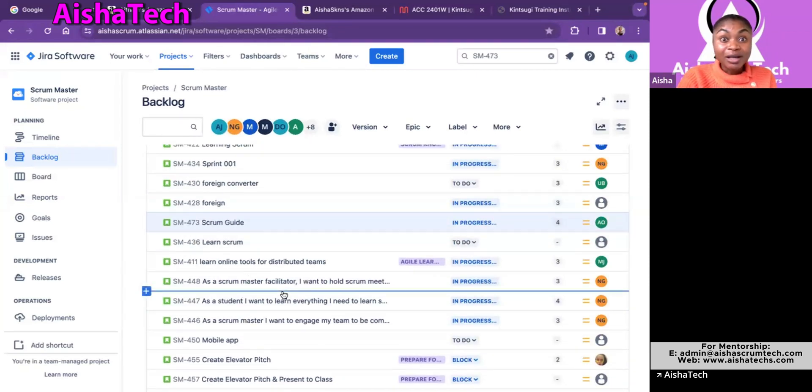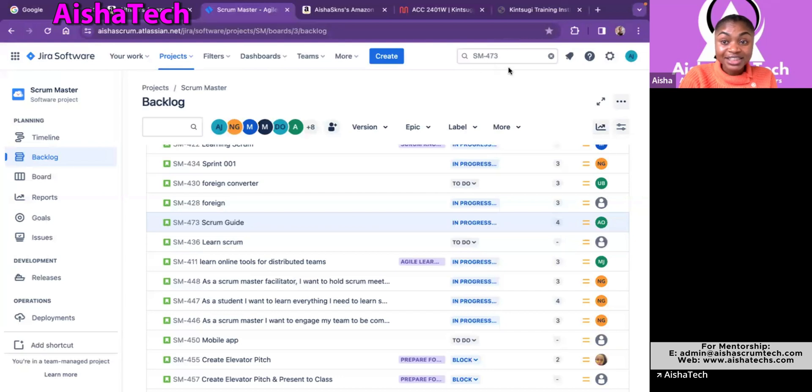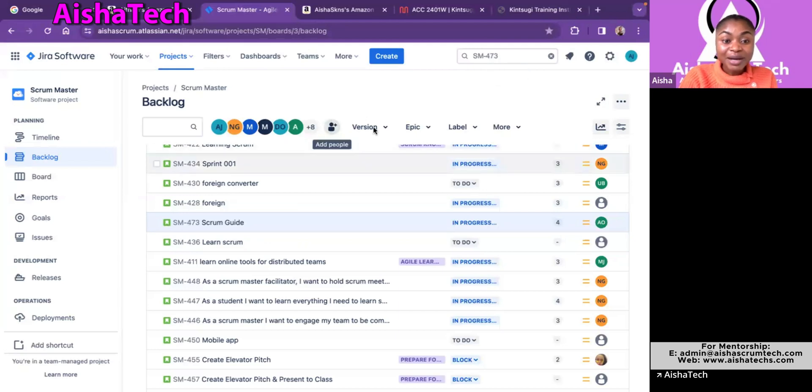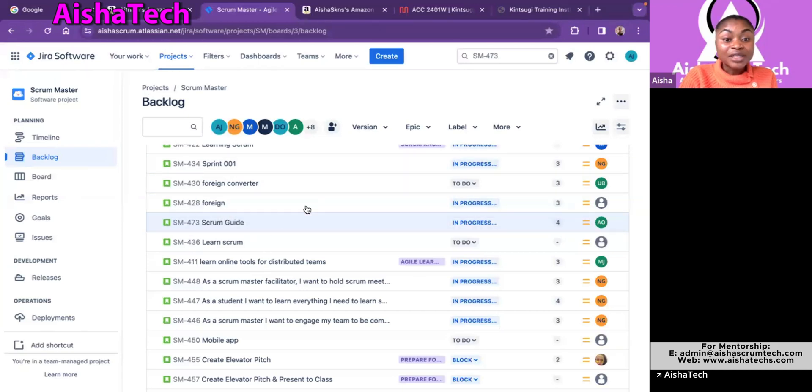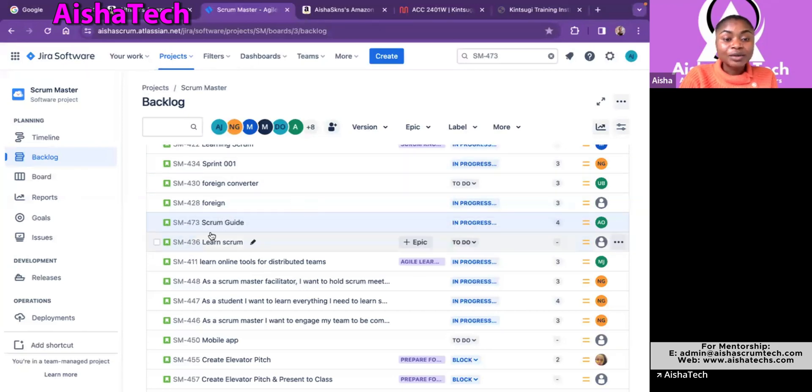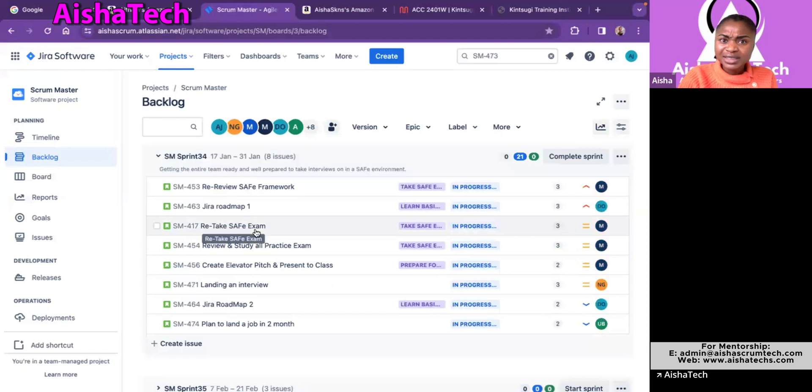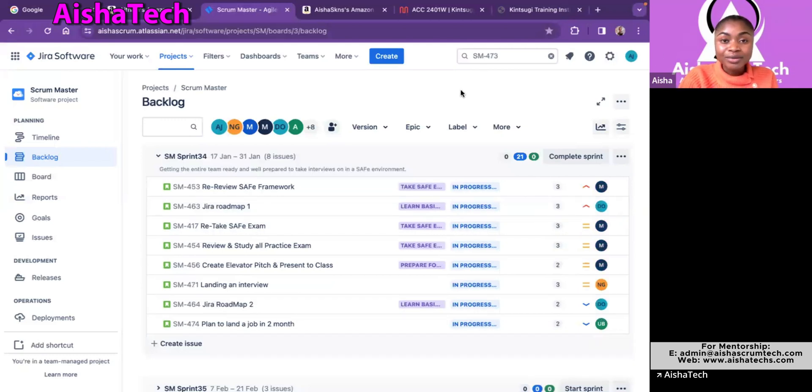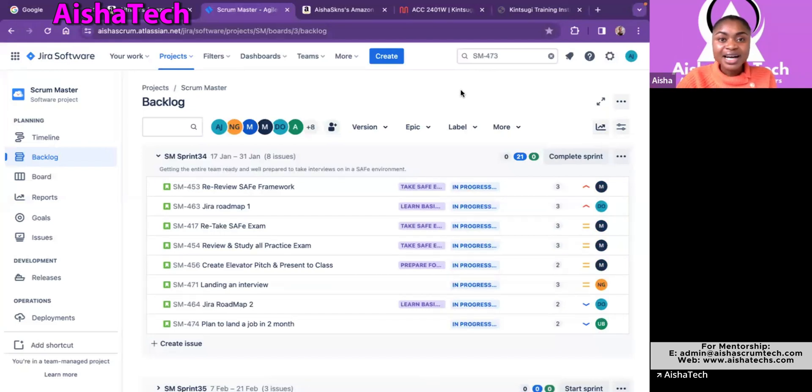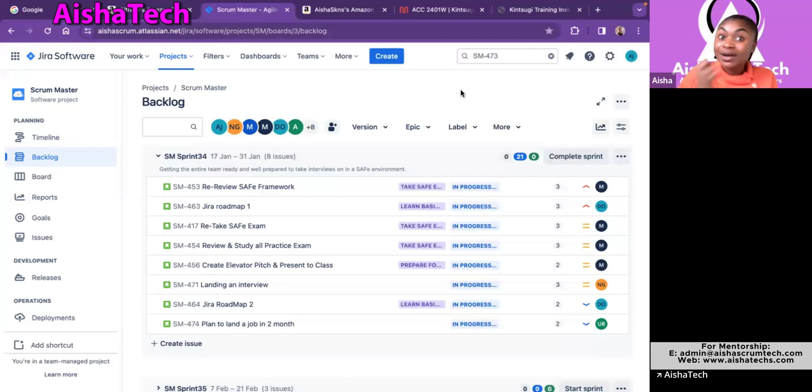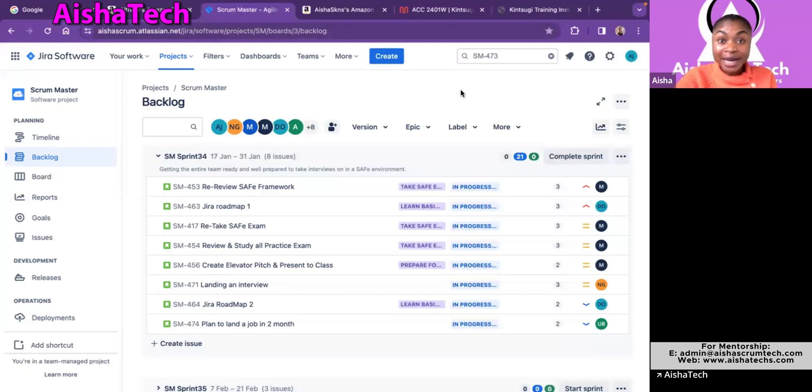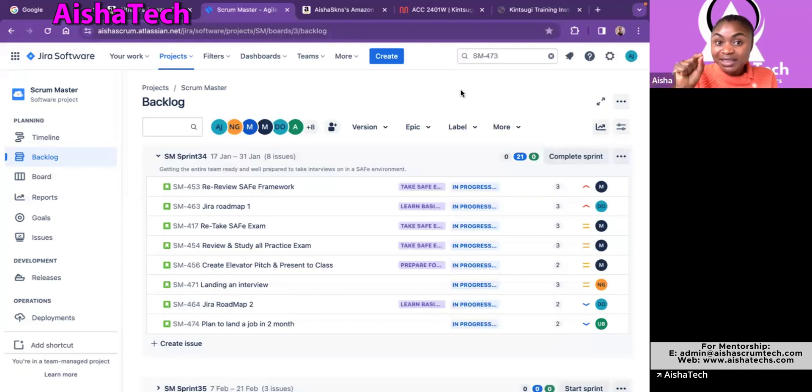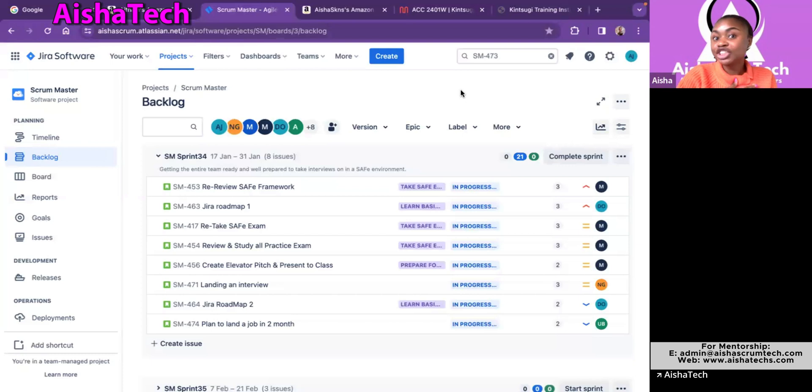And then if I go all the way down, I should see the story. Then if I take out the sprint from that and I delete the sprint, you must be wondering, where did the story go? The story actually go to the product backlog. The story will always go to the product backlog. And if I come here and look at SM 473. And if I come to the product backlog and look at SM 473 that we searched initially up here, this is what we searched and we took out. And I hit the delete. So it left the sprint's backlog and now came to the product backlog. You see? Backlog. And look where the story is at. So now the story is in the product backlog. But what did you notice the difference? What did not happen? When I went and opened the story, searched the story and X it out, what did not happen? Jira did not warn me. Jira did not give me that warning that you are taking this out of the sprint. It's like how it was doing with the other way around when we were dragging up and down, selecting the three dots. Jira was giving me warning. So when I just go and open the full story and X out and X out the sprint for that in that particular story, it just literally took it back to the product backlog and Jira did not give me warning.